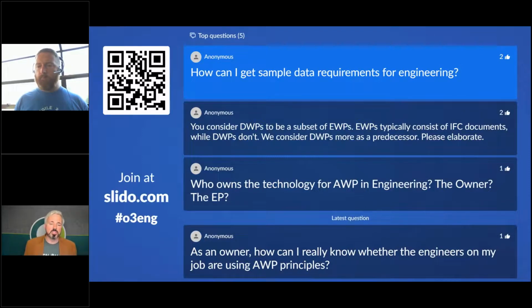So this comes down to when you define your EWP buckets, right? If you define your EWP buckets much earlier in the project and you say, hey, I don't have everything defined inside this, but I've got these buckets, similar to how I have early creation of CWPs when I'm doing early path of construction. Those haven't been fully elaborated. I don't understand everything that's inside that, but I have those holders, those buckets. I have a framework of AWP entities, and those will become more detailed over time.